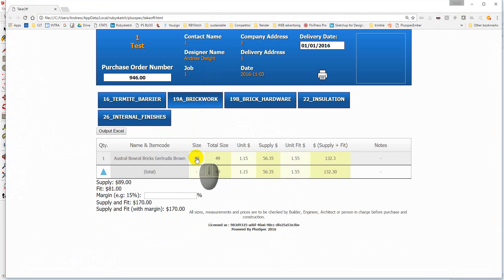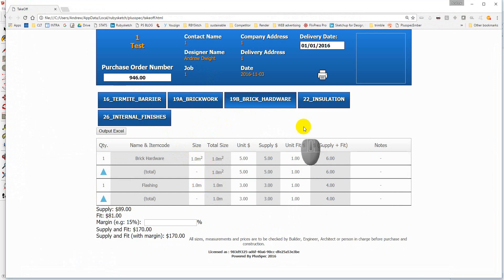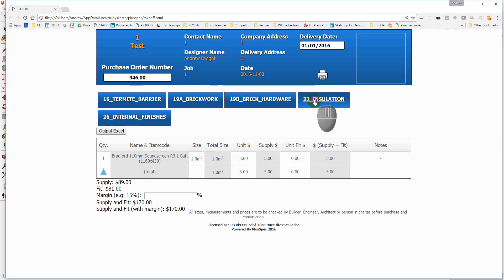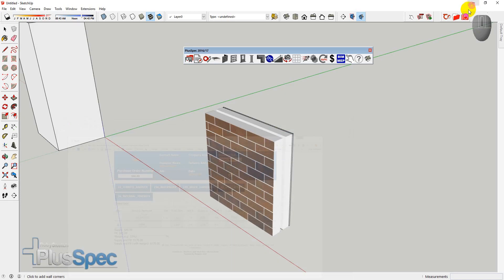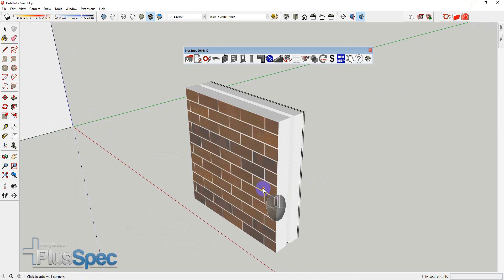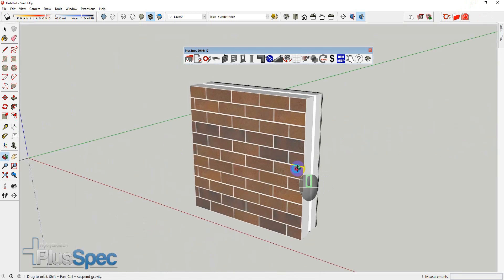We have 49 bricks in a square meter. Brick hardware. We have one square meter of brick hardware and one lineal meter of flashing underneath the wall. And in our insulation, we have one square meter. And internal finishes, we have one square meter.